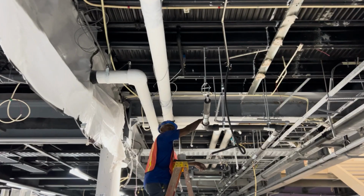So question, you've worked on all these airports. What is different about the Princess that you've never encountered at another airport when it comes to the reconstruction project? The reconstruction project is so much more complex and difficult than a new build project. Because in a reconstruction project, you first have to look at what is existing, and it was very well prepared by the architects. But you always encounter things. Plus you need to keep it operational. And to keep things operational with so many passengers, it's not easy to look at ground, top, bottom.